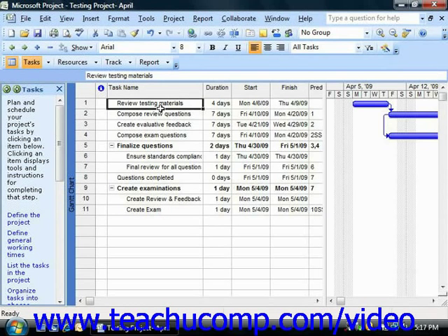To allocate resources to tasks, you need to be able to select the task items. You should switch to the Gantt chart view of your project file when assigning resources. You can also see the changes to task durations in this view as well. Now, a helpful feature of the Gantt chart view is that you can view resource assignments for selected tasks in a separate task form within the Gantt chart view.